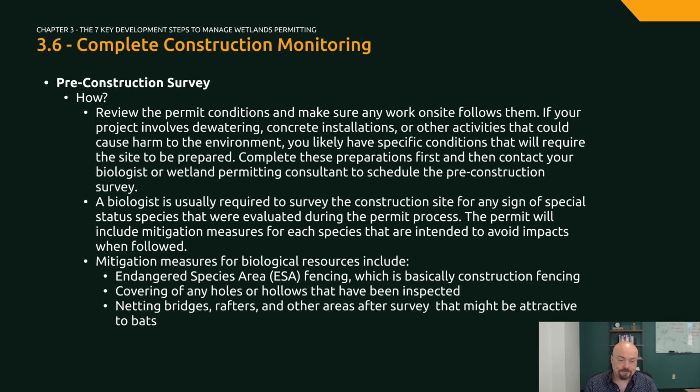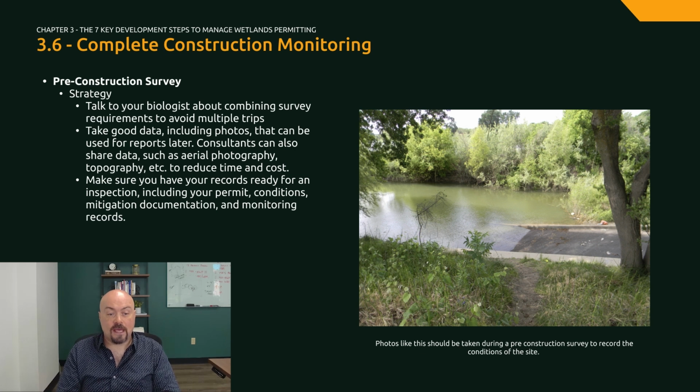Some good strategies for handling pre-construction surveys include talking to your biologist about combining survey requirements to avoid multiple trips and taking good data, including photos that can be used for reports later. Oftentimes, reporting is inhibited by how much or the lack of data that has been collected in previous surveys. It can also be helpful to talk to your consultants about how they can share the data, such as aerial photography and topography, to reduce time and cost.